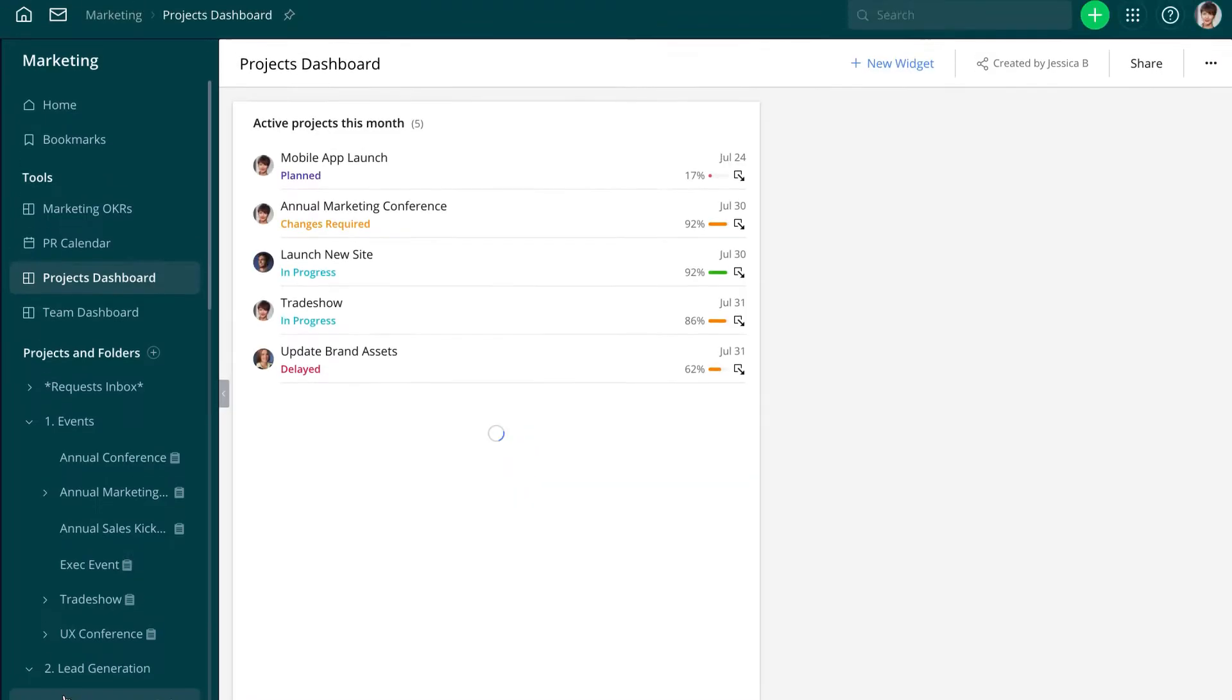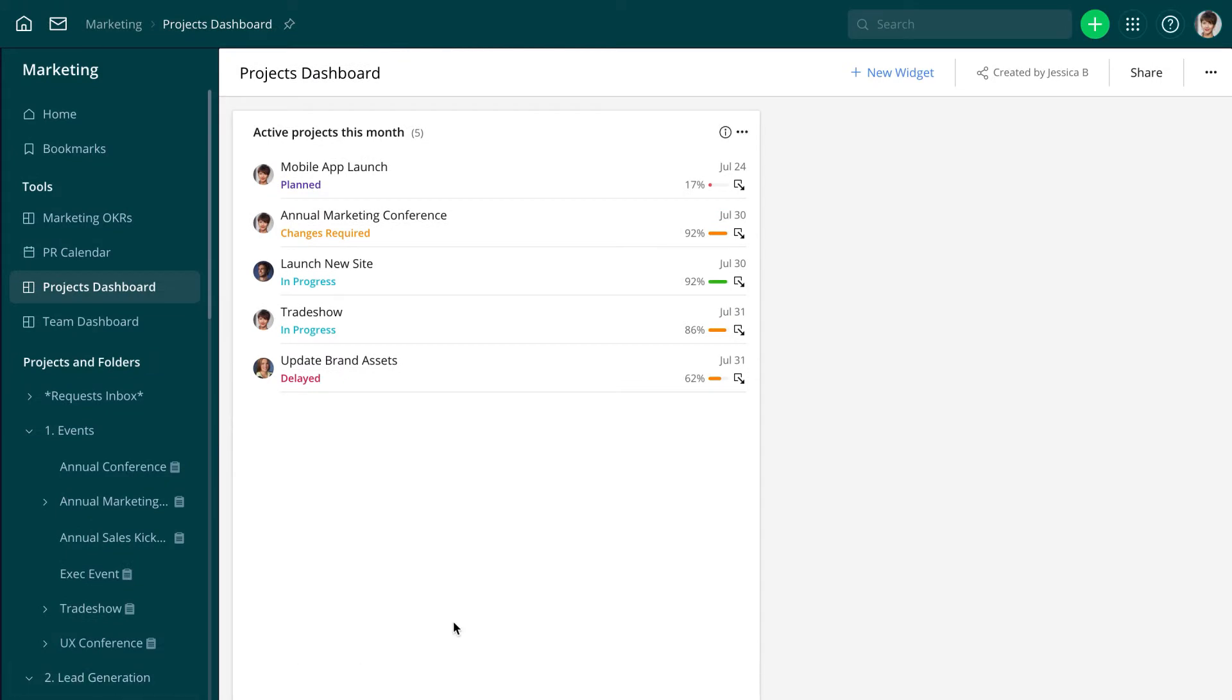With this widget, Jessica can immediately identify those projects that require her attention by checking the progress bar color and completion percentage.